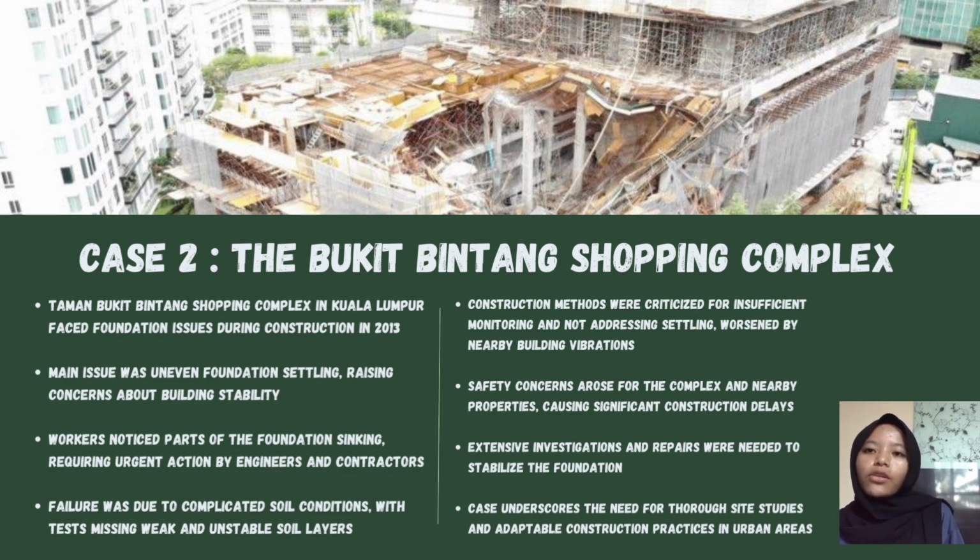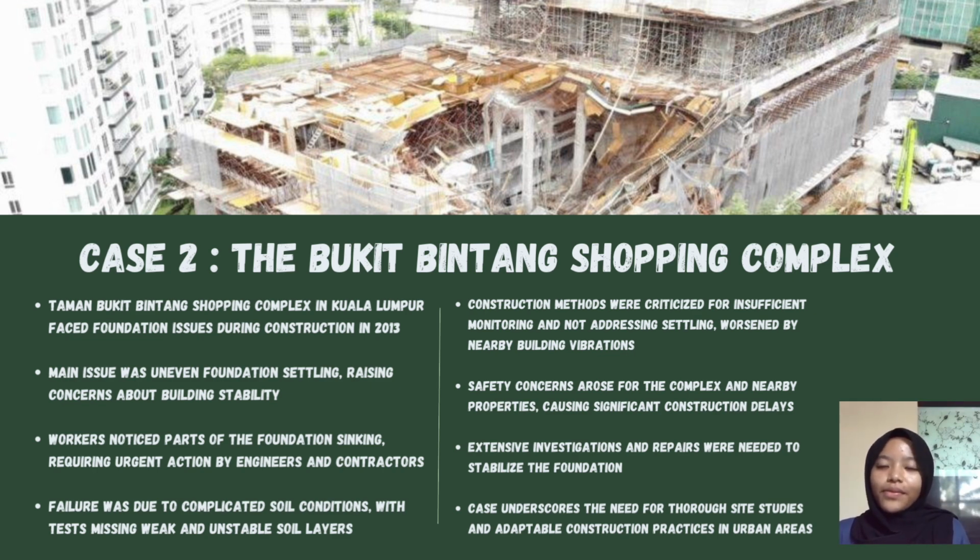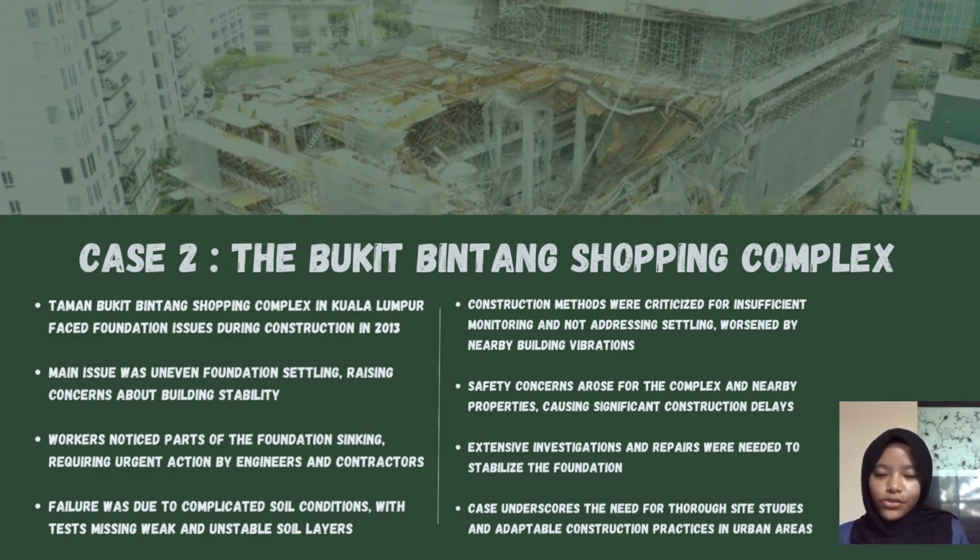The first one is the complicated soil condition that was not truly shown to the ground, and the second one is a construction method that failed to adequately monitor and address the settling issue. This led to safety concerns for the complex and surrounding property, causing considerable construction delay. So the engineer should conduct an investigation and restore stability to the foundation. This case highlights the importance of thorough site study and flexible construction.